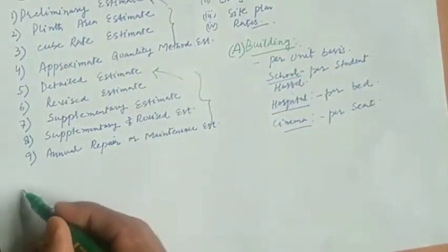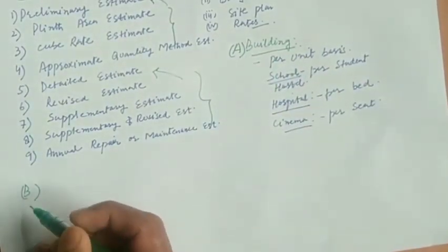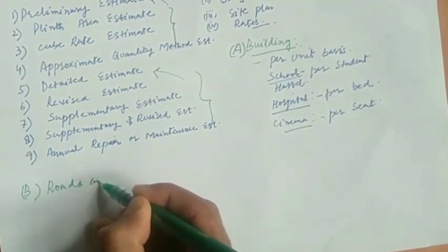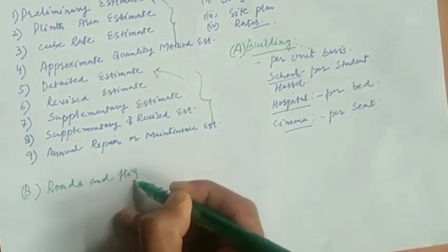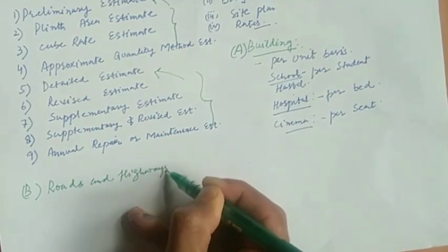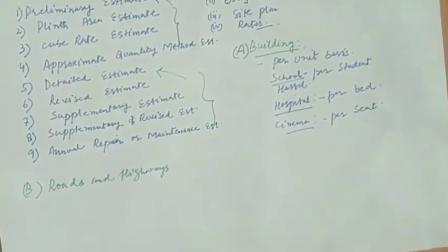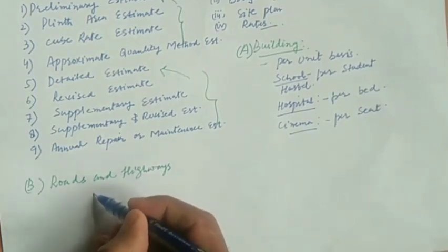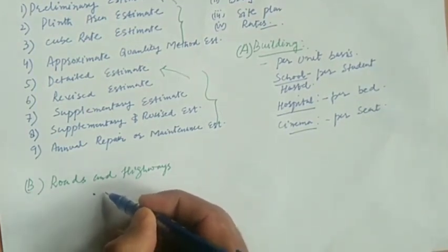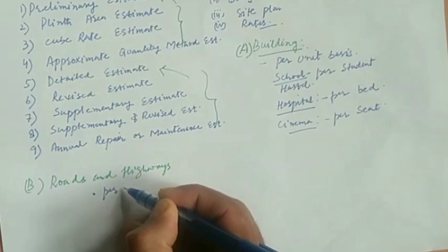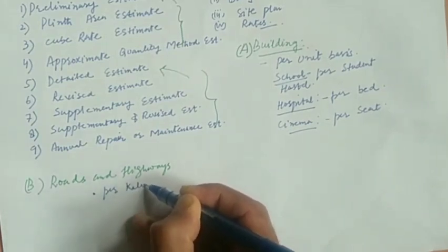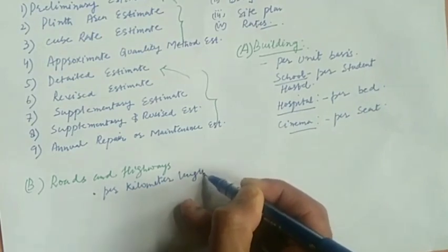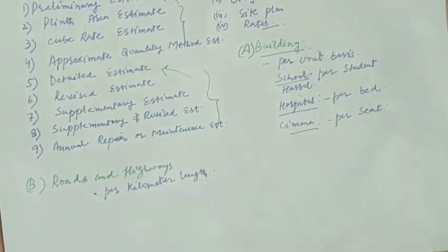Now, if I talk about the roads and highways, it is prepared on the basis of per kilometer length.